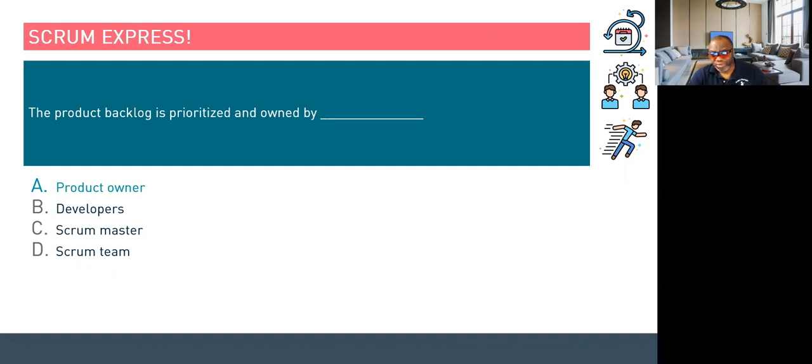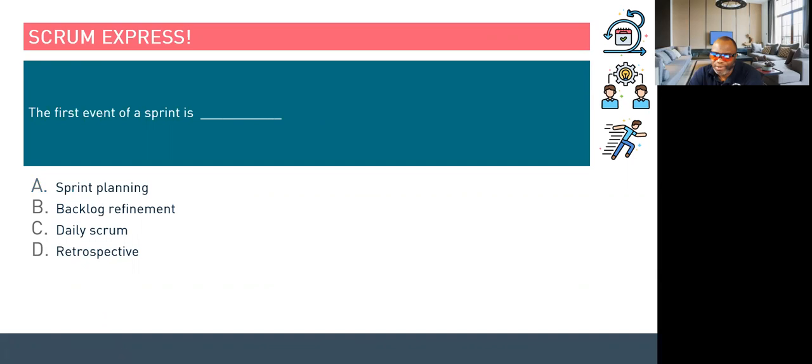That's why the word owner, right? Owned by the owner would make sense, right? So the product owner who owns the backlog. The product backlog should also be prioritized by the product owner, of course, with the help of the team, but who owns it and whose job is this? It's the product owner. All right, here's the next one. The first event of a sprint is...